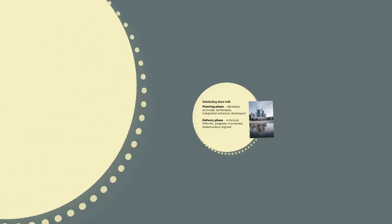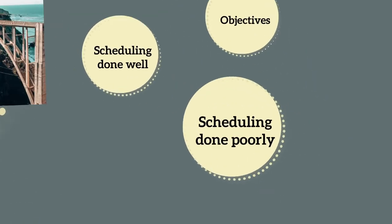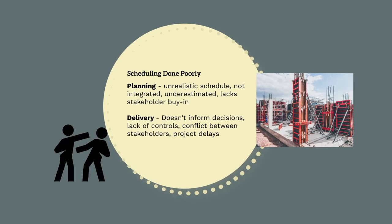When project scheduling is done poorly, it's pretty much the exact opposite of what it looks like when it's done well. During the planning phase, an unrealistic project schedule is developed that does not reflect the actual realities of the project. In the worst case, the time required to complete the project is significantly underestimated. The project team, stakeholders, and subcontractors do not review or make input into the project schedule.